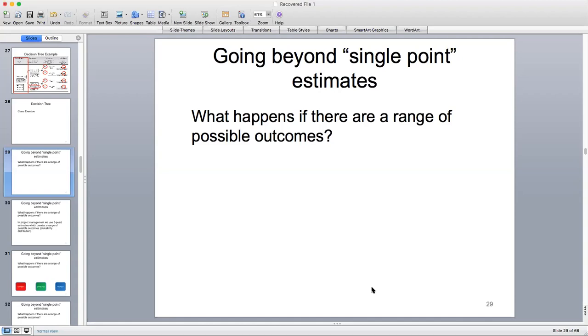But operations and projects are very different. And as we know, projects do not make companies profit. They don't make the company money. They cause organizations to incur costs that can deliver something that will create profits in the organization down the road, but the project itself does not create a profit. So many of the models that you'll see in decision trees are using examples of operations that deliver a profit. But in project risk management, it's important to look at that in terms of the best EMV value is going to be something that is the lowest cost in most cases.